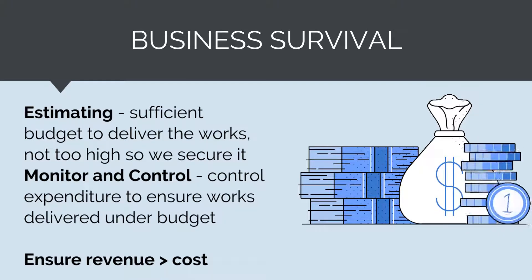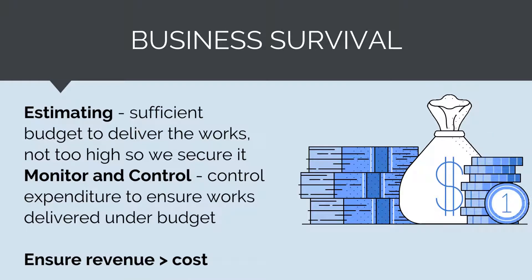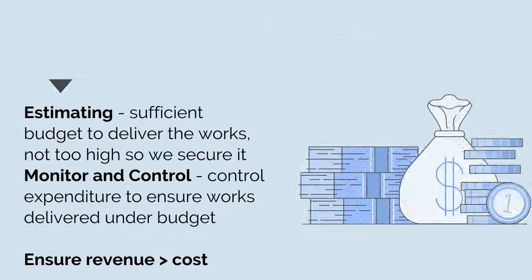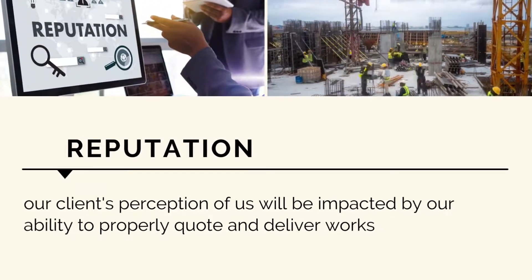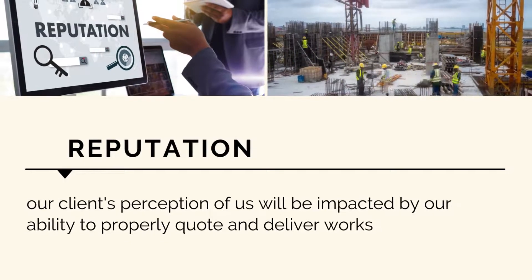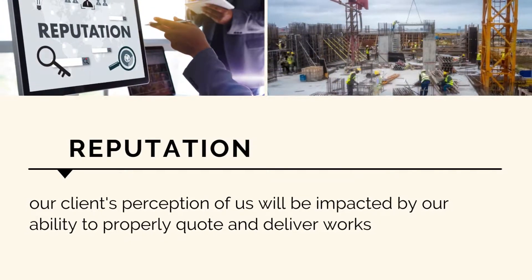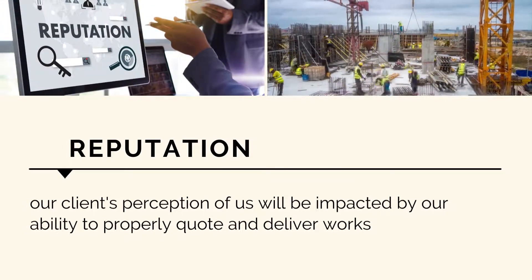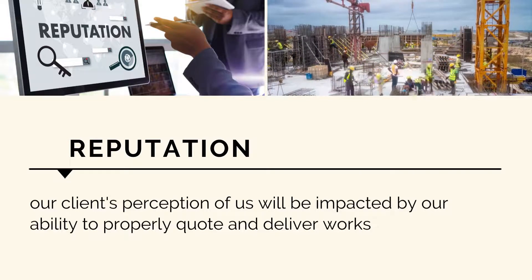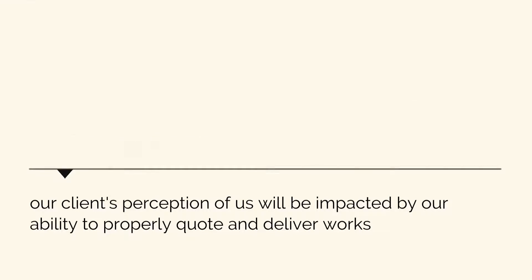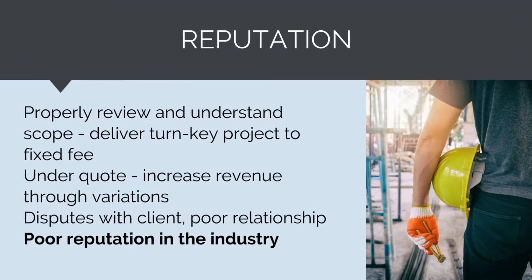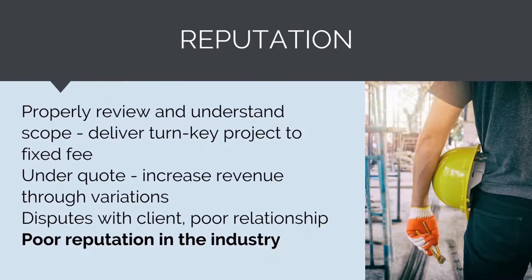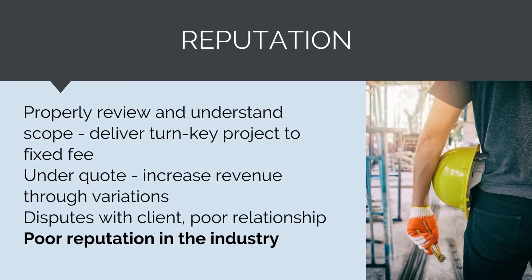Where it looks like we're going to overspend, we'll need to put in place treatments. This will ensure we generate a profit with our revenues being greater than our costs. The next thing we need to consider is our reputation amongst our clients. As a professional contractor, our clients are engaging us to deliver a scope of works under a fixed fee. We need to be able to properly quote and then deliver works in accordance with that quote, properly reviewing and understanding scope.